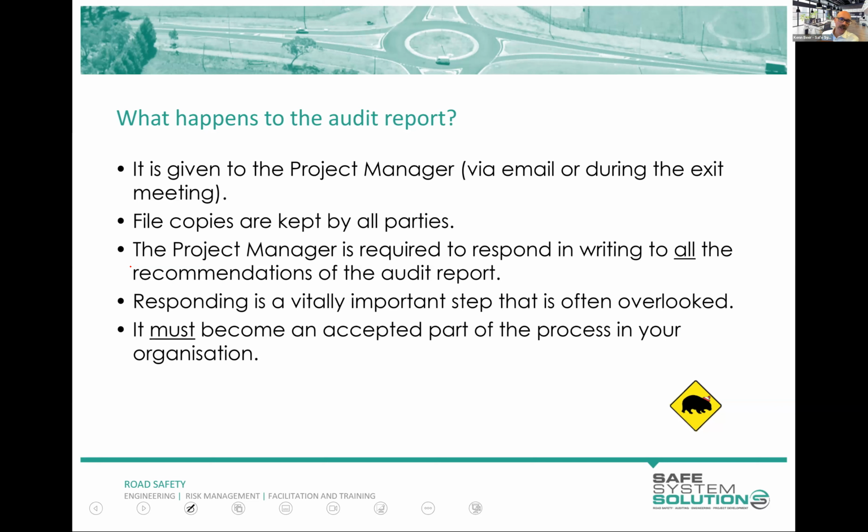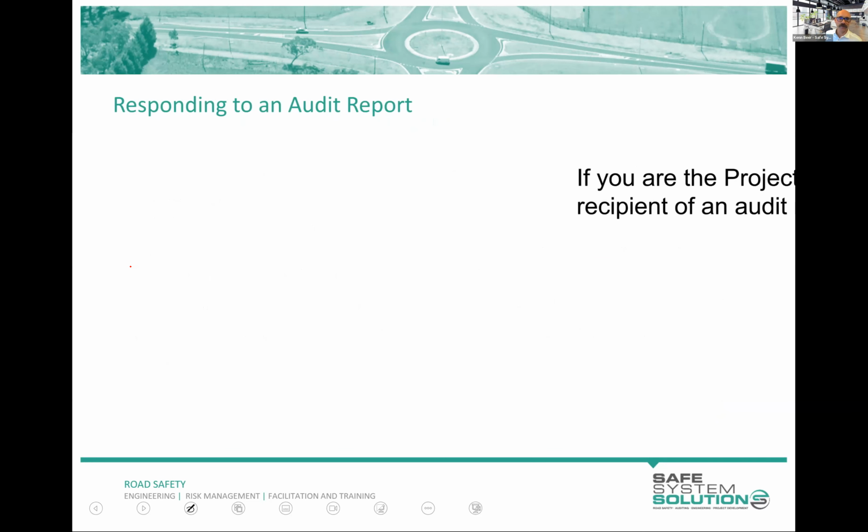If audits are done and there are no responses to those, that's a real smoking gun in a legal case, because an expert has been engaged to identify risk and then nothing's been done with it. So it really needs to become an accepted part of the process within an organisation.